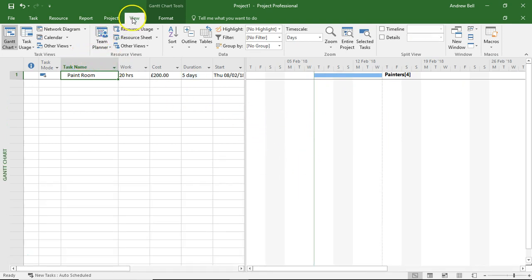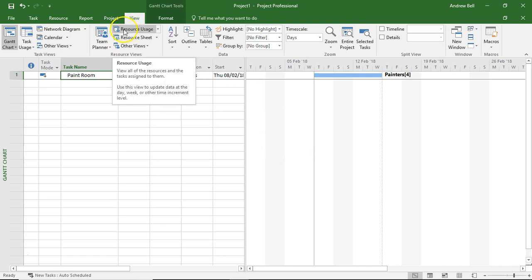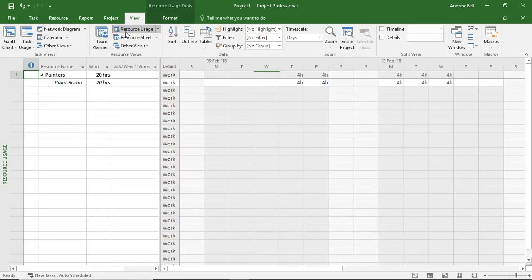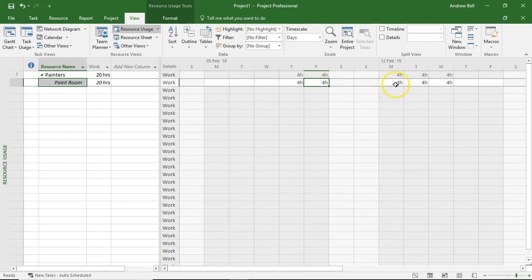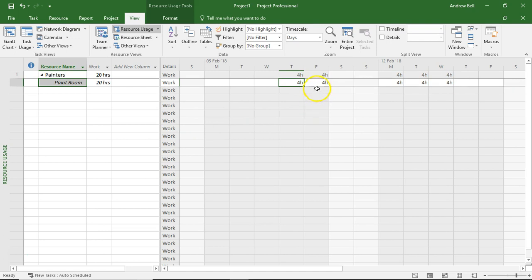Let's have a look at the resource usage view and we can see the painters are only busy four hours every day, which means they're only going to charge four hours to my project every day, which means they've got time to drink some coffee, set up, arrive a bit late.